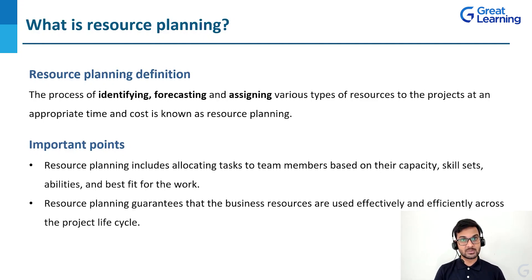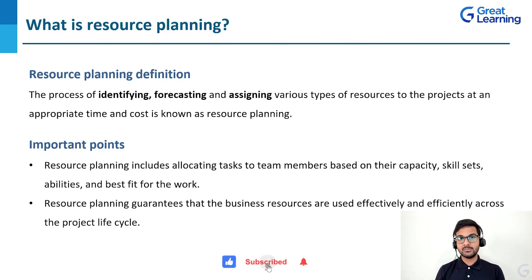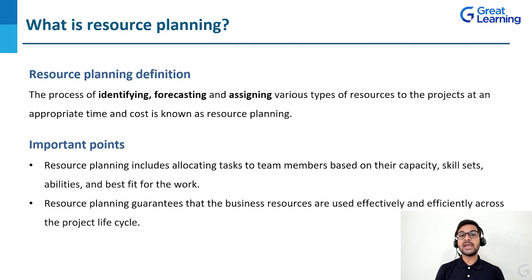Resource planning includes allocating tasks to team members based on their capacity, skill sets, abilities, and best fit for the work. Imagine that for a particular task, ten people are required. If we have only eight people, we have to figure out how to utilize them or hire two more. We have to analyze the skill set and capacity of each and every person involved in that project and based upon that, allocate or assign the tasks to them. That is nothing but your human resource planning or manpower planning.